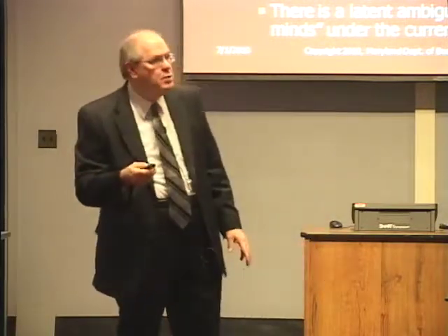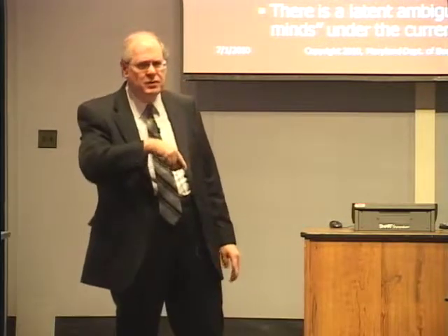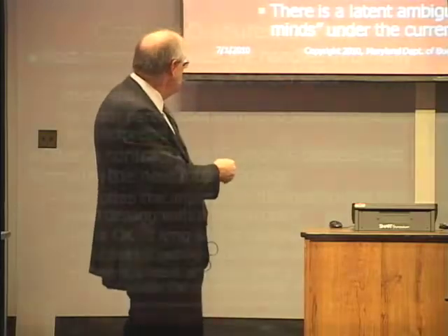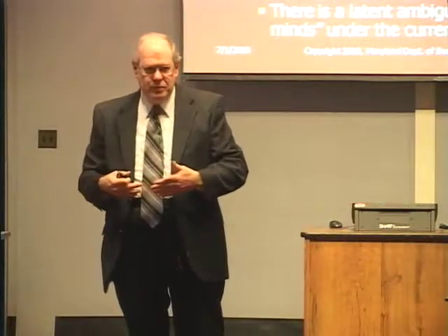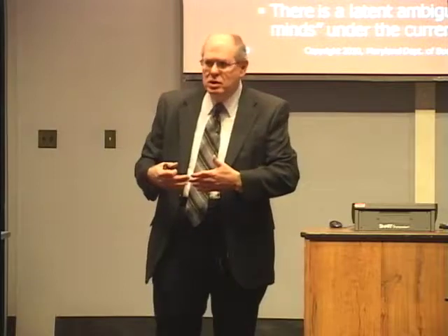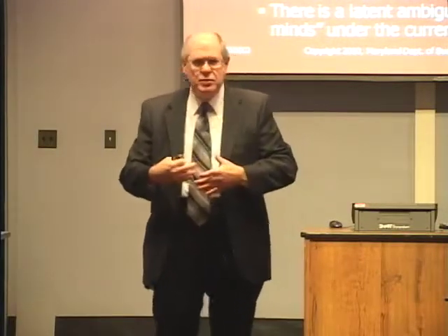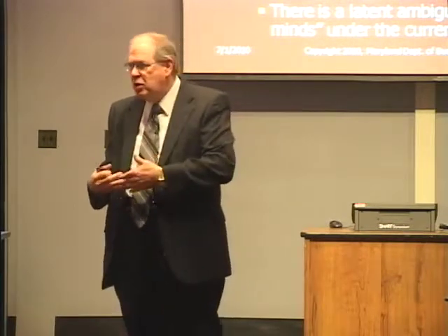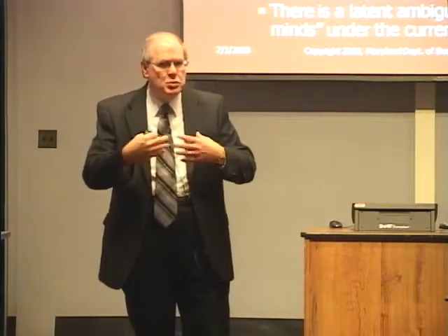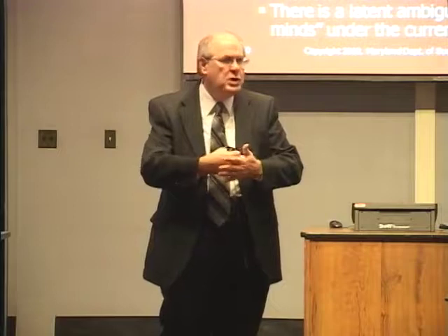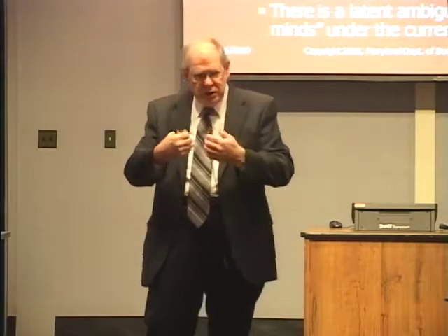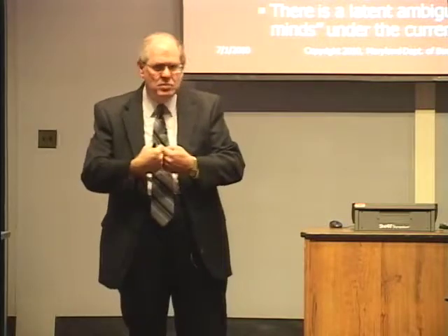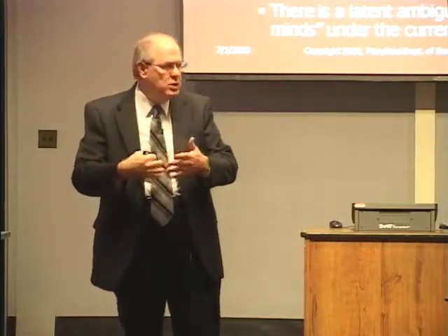the thing that I have mentioned in planning at the very least about ambiguity is the rule. A latent ambiguity means a hidden one that was not obvious, one that you really could not reasonably have discovered before the contract was entered into, so that it only becomes apparent somewhere in the performance of the contract, when we ask for something perhaps and they say, wait a minute, the contract doesn't call for that, and we say, yes it does, and they say, no it doesn't, and that's when we find out that some point that we thought said one thing, the vendor thought meant something else, and we both get to the point that, gee, until we got to this point in time and had this issue come to the forefront, neither one of us knew there was really an issue with understanding.